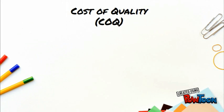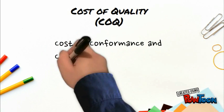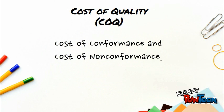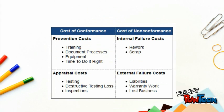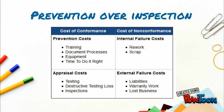The cost of quality includes money spent during the project to avoid failures and money spent during and after the project because of failures. These are known as the cost of conformance and the cost of non-conformance. The cost of preventing mistakes is usually much less than the cost of correcting them — this key quality concept is called prevention over inspection.